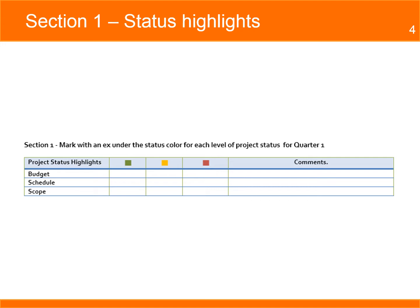The indicators are green when the project is on track with no delays and no issues, yellow when the project is slightly off track with schedule and cost variances less than 10%, and red when the project is off track with schedule and cost variances higher than 10%.